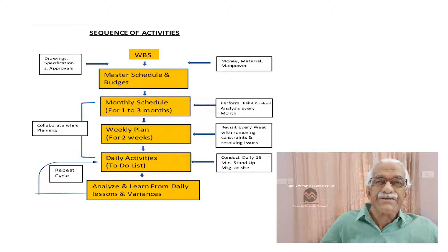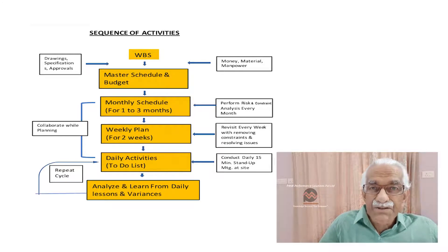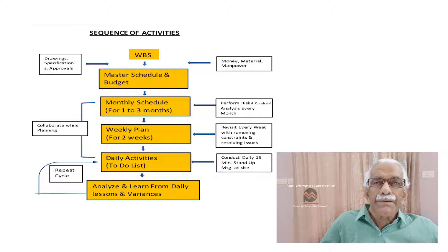Fourth step. Break that master plan schedule or the milestone schedule into a monthly plan. Each month having four weeks. Make it for one to three months. Now, the activities in that monthly plan will be accordingly of that magnitude, which can be completed in a month or maybe overlap into the next month.